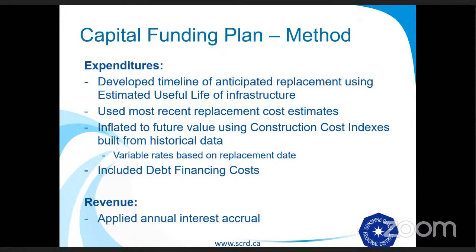The method we took — a broad strokes explanation of what we did to come up with this capital funding plan: we looked at the expenditures we had coming up. We developed a timeline of anticipated replacement using the estimated useful life of the infrastructure. Where possible, we used the most recent similar cost estimates. We inflated the values to the future value using the construction cost indices shown before. And where we anticipated borrowing money to complete the construction, we included debt financing costs. On the other side of the ledger, as we anticipated a reserve to be built up, we applied the annual interest that would be accrued from that.